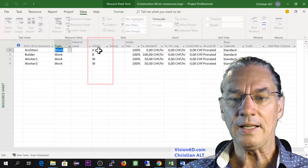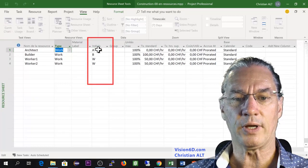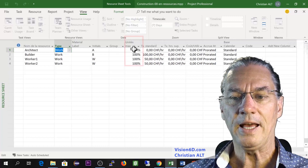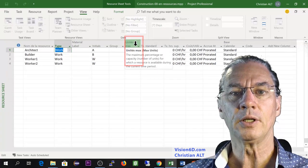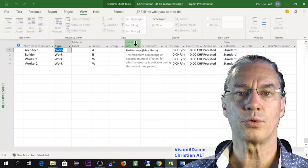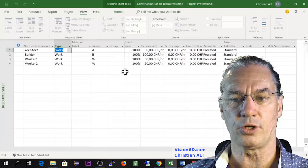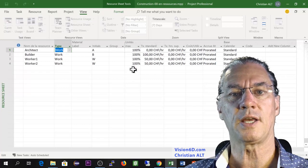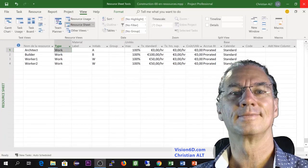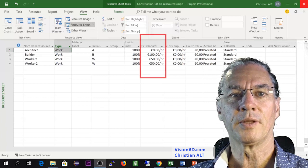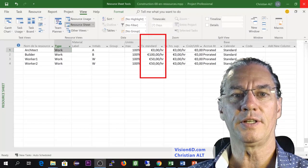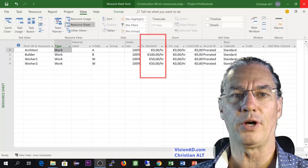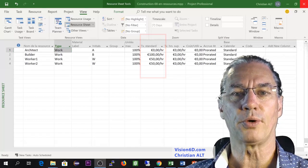In this column here you see that it has summarized the name by an initial and here you have a column in which it is set to which percentage this resource is able to work in the project. For here we make it simple. Everyone is able to work 100%. You see here that you have a rate. So the builder is a hundred euros per hour and workers are 50 euros per hour.